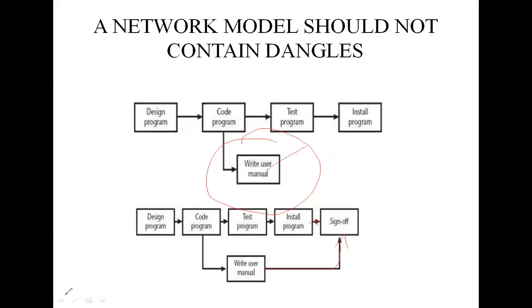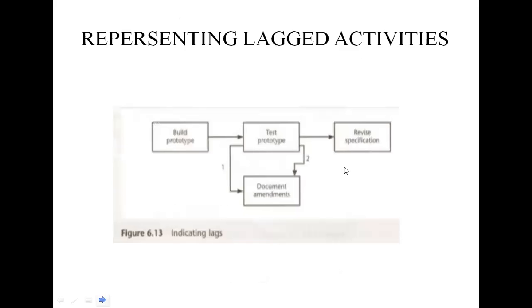Okay, clear? Anybody has any doubt? Please write a message in the chat box. Here, write user manual is the dangling problem. So we solve it by connecting it to the sign off, and the installation is also connected to the sign off. Then we solve the dangle here. Okay, clear?